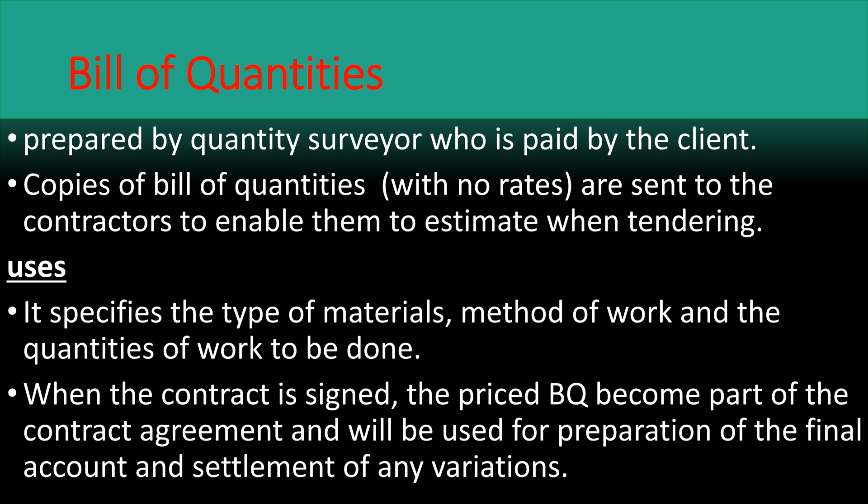The third document is the bill of quantities. It is usually prepared by the client's quantity surveyor, whose fee is paid by the client. Copies of the bill of quantities are sent to the contractor to enable them to estimate when tendering. The bill of quantities specifies the type of materials, methods of work, and the quantities of work to be done. The quantity surveyor gives instructions such as excavate, deposit soil away from the site, and also gives directions about how the work shall be done. The bill of quantities usually gives the price of the project.